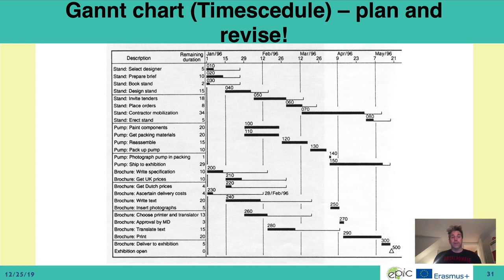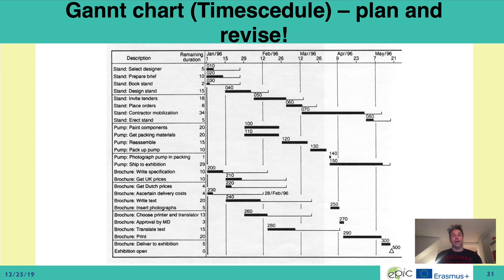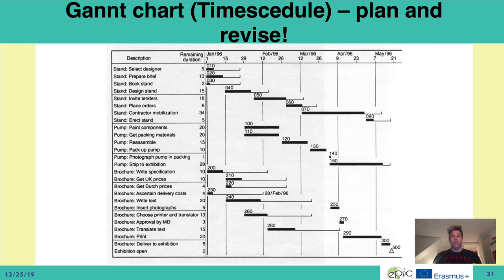This is a Gantt chart, which is just an example. The point is not to make the Gantt chart from the beginning, but to plan and revise it all the time. You set up different milestones, and if for various reasons you didn't make a milestone, you can decide what to do. You can decide you need to reduce the project scope, work harder, or that the deviation is small enough that you'll be able to catch up. Or you might have buffer time — if you allocated two weeks for buffer time and you're two days behind halfway through, that's not so bad, because you can still manage within your buffer zone. The important thing is that when deviating from your original time plan, you make a decision about what to do and create a new plan that you believe in.